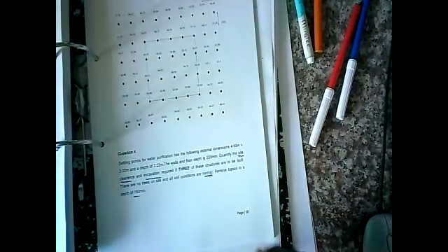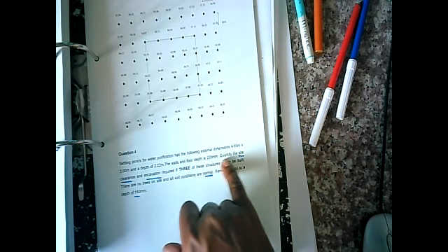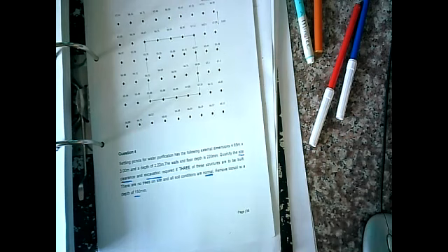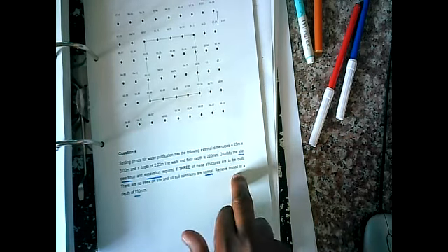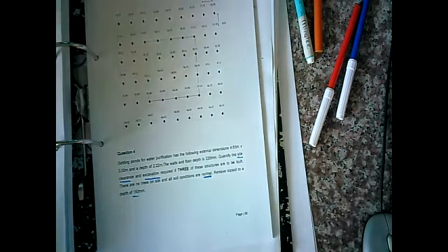All right, page 56. I'm looking at question 4. Setting ponds for water purification has the following external dimensions. The walls and floor depth is that. Quantify the site clearance and excavation required if 3 of these structures are to be built. There are no trees in sight and all soil conditions are normal. Remove topsoil to a depth of 150 millimeters.